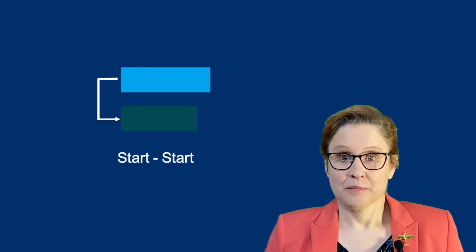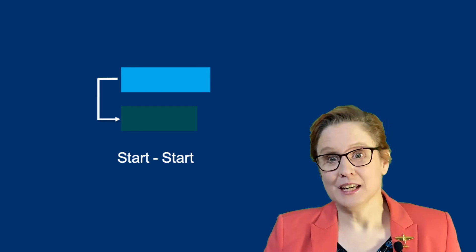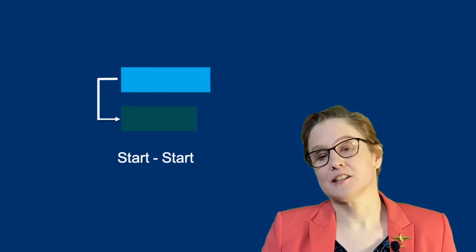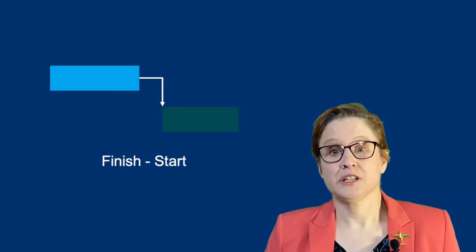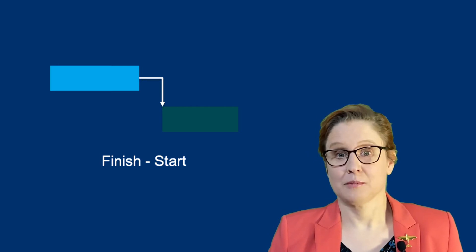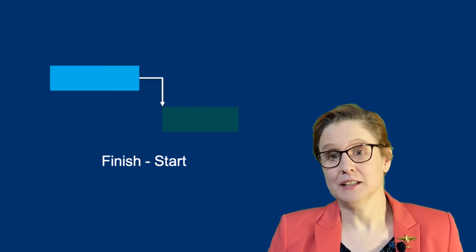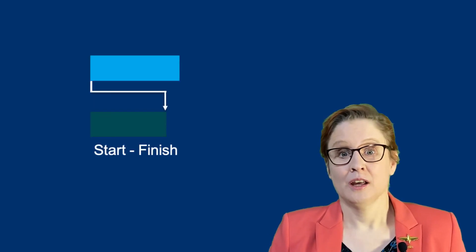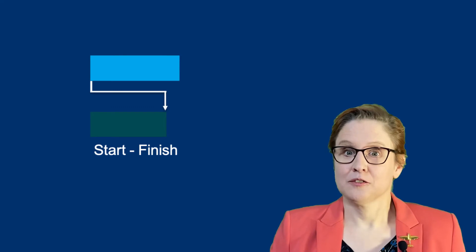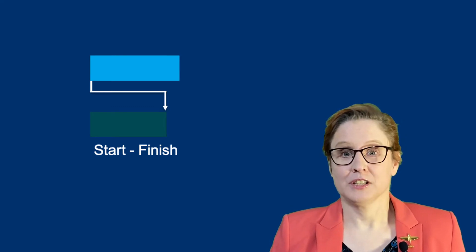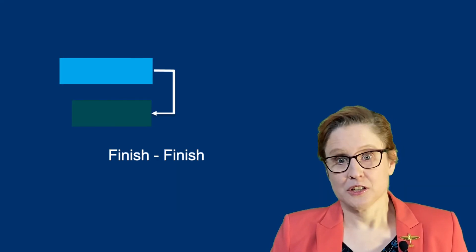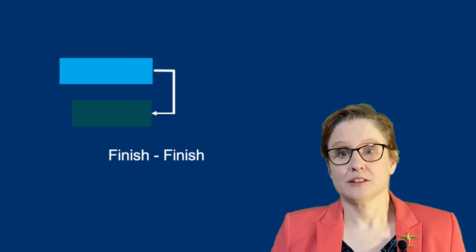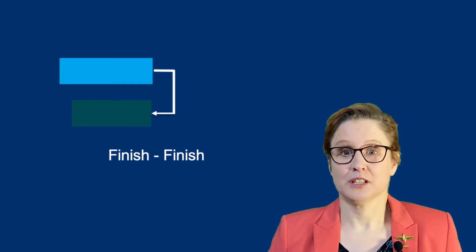Start to start, the preceding activity must end before the next activity can begin, and finish to finish, the preceding activity must end before the next activity can end.